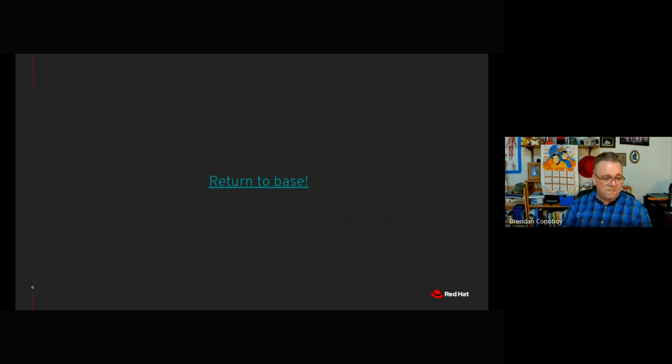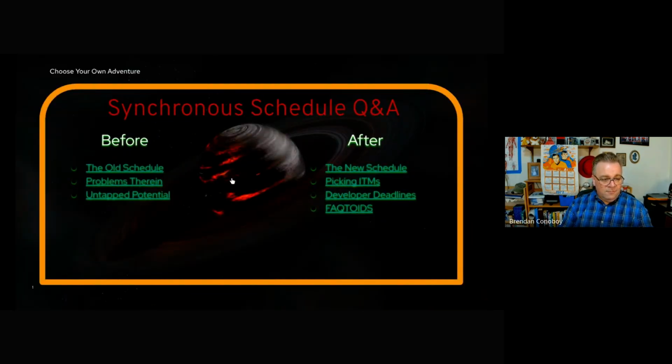So that was the schedule. And there were a lot of issues with that. I'm going to call out a couple of them, and if people want to go deeper on any of those things, just a few of the things to really call out are, beyond just the chaos of knowing what priorities were, the schedule was so heavy on the verification side that there was almost no time to actually develop new code. And in fact, when we made a beta release, according to our stats, about 40% of all changes went in after beta. So beta wasn't feature complete. Nothing was fit for purpose.